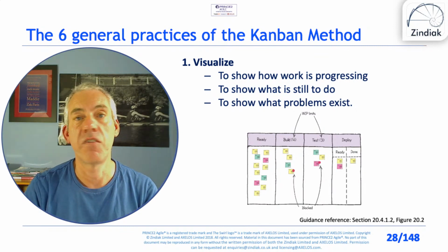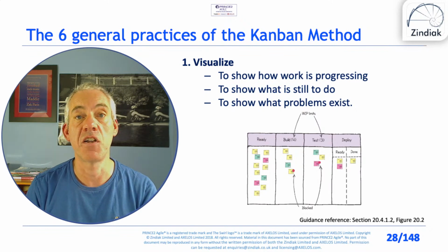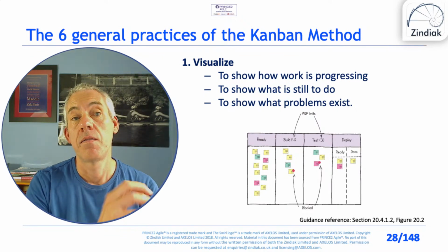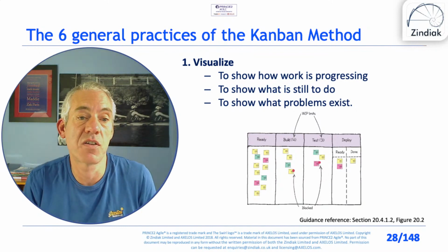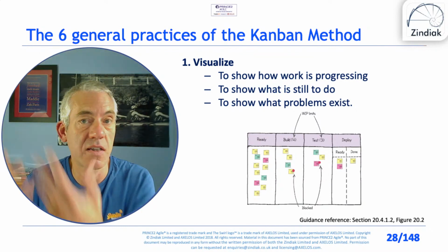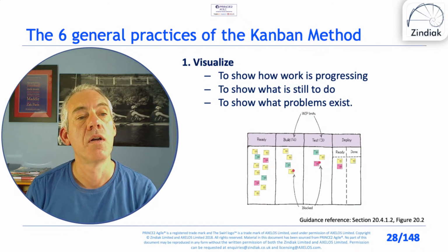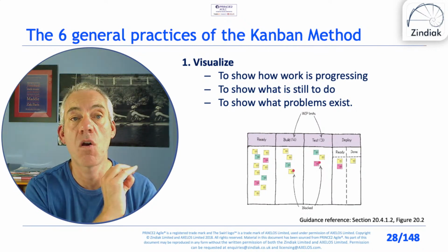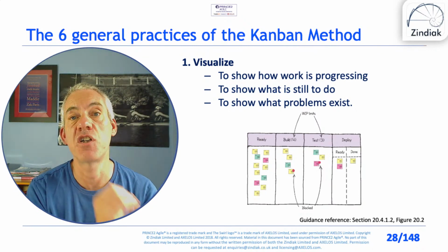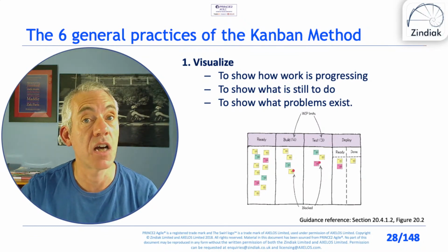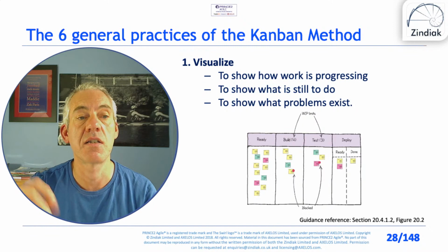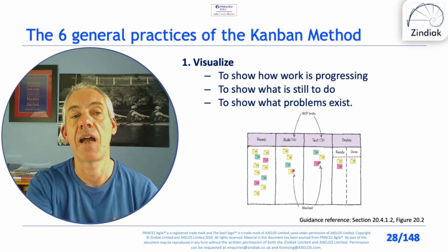It may not be for a different Scrum team. The definition of done might be unit tested, ready for integration testing, because we've got several Scrum teams and we're integrating their work output. Ready is ready to be built, so sufficiently well defined and estimated and prioritized, very importantly prioritized, that a developer can take work.